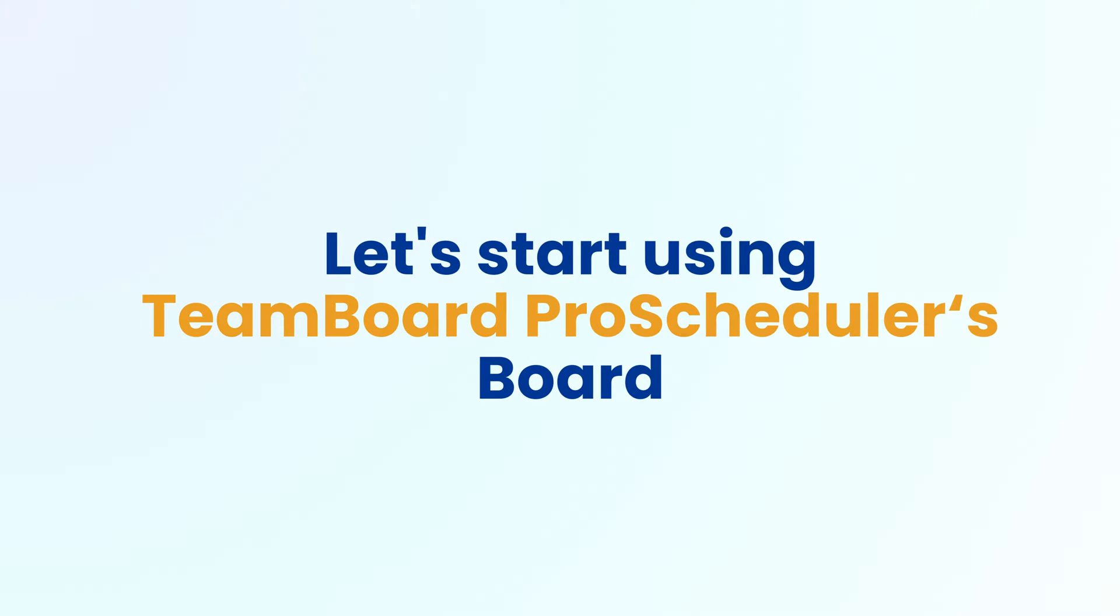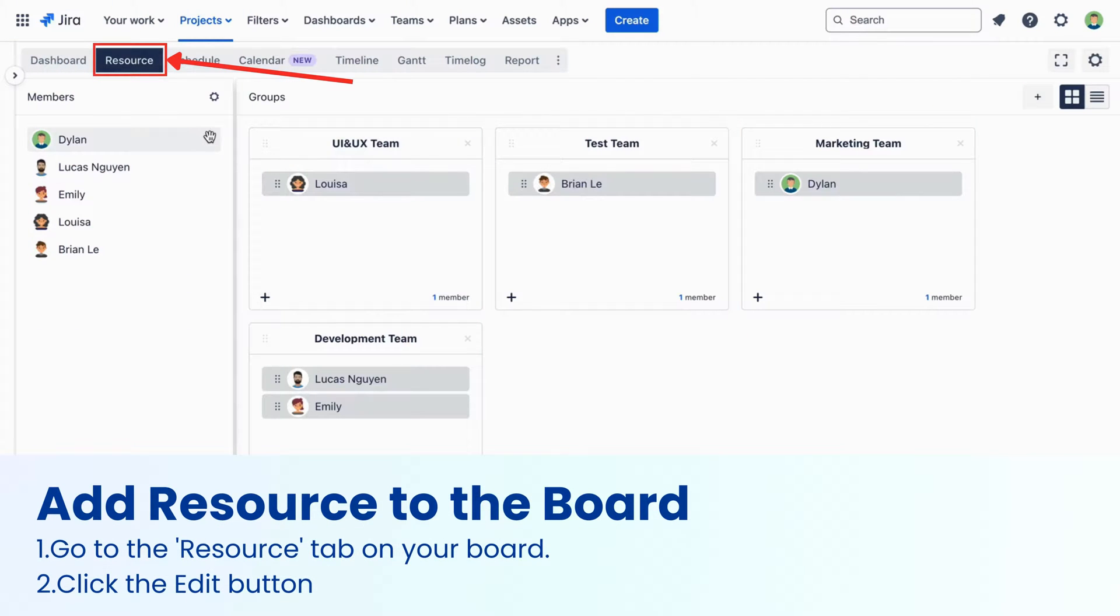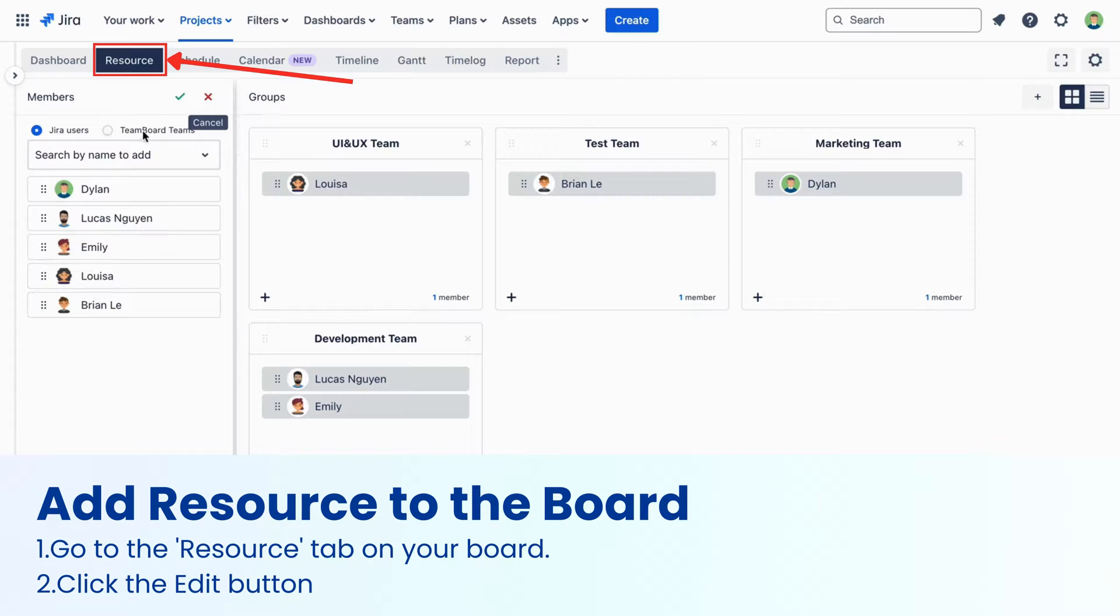Before you start scheduling tasks on your project or program board, you need to add your resources. Here's how. Go to the Resource tab on your board. Click the Edit button. This lets you change and add people or whole teams.